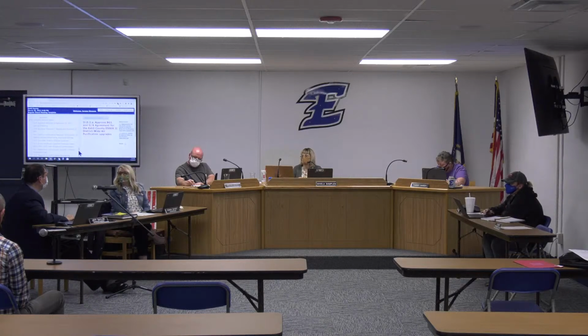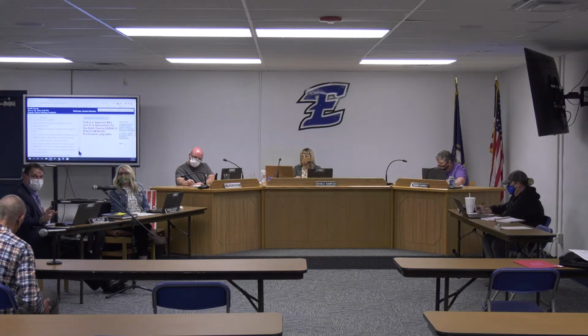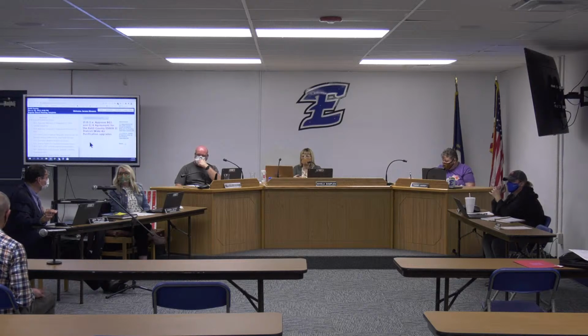And before we let Peter get out of here, Peter, if you don't care, just a timeline on these. These are going to move pretty quick, my understanding is. Yeah, we're expecting to have construction documents ready for you guys at next month's meeting. And Jeremy, I think, is now going to upload the BG1s to KDE. KDE will review that and assign a tier to the projects, which probably means they can go straight to construction documents, and we can get out to bid really quickly. So I expect to have construction documents for you next month, and go to bid and work starting in May.